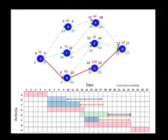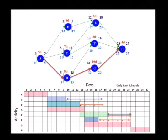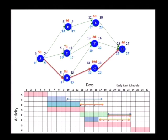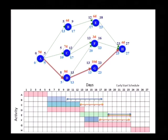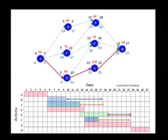Now we come to interfering float. If we take B, you can see that as B starts moving, it interferes with E. How much can it interfere with E? Five days. The first three days it does not interfere with E; the remaining five days it interferes with E. So out of eight days of total float, three days are free float and five days are interfering float. Does that give you any clue about interfering float?